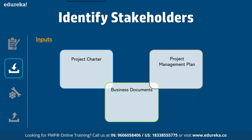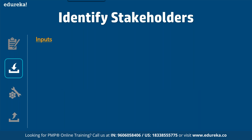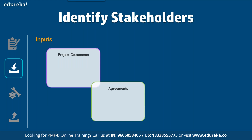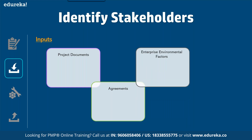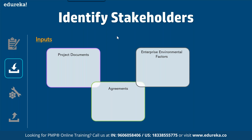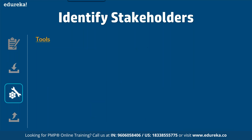We also have three more inputs: project documents, which contain your change log, issue log, and requirement documentation; agreements, which have information on parties that will agree among the project stakeholders; enterprise environmental factors, which include government or industry standards, geographical distribution, organizational culture, political climate, and governance framework; and organizational process assets, which include stakeholder register templates, instructions, and all related information.